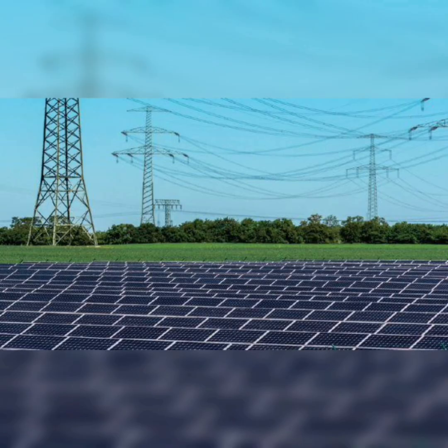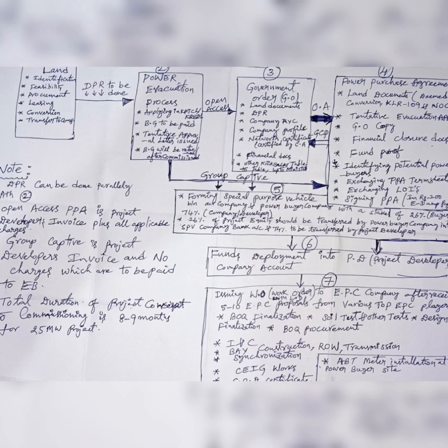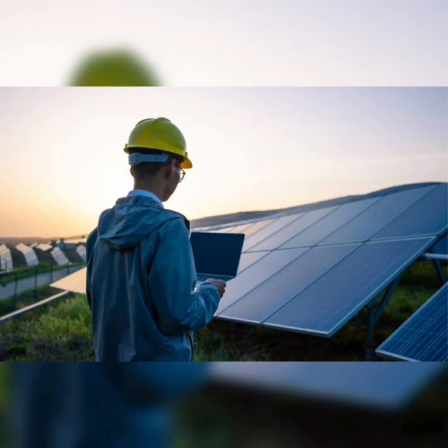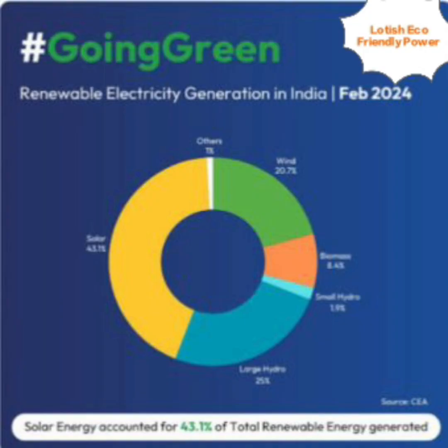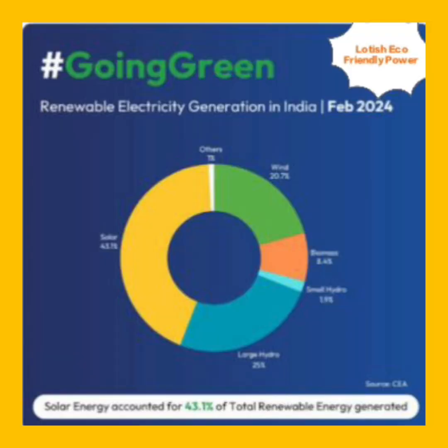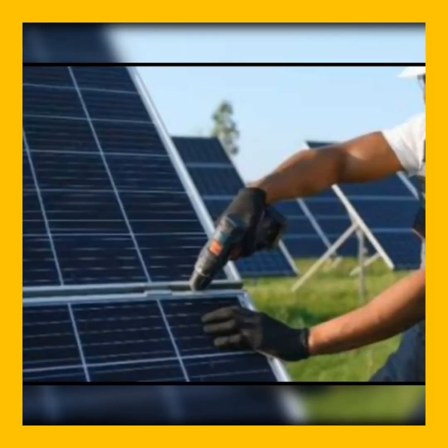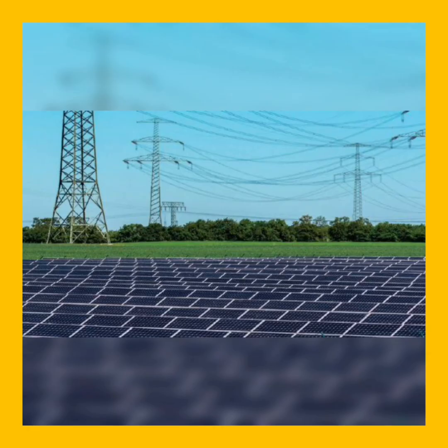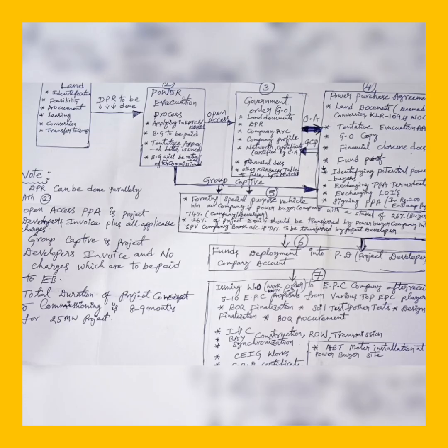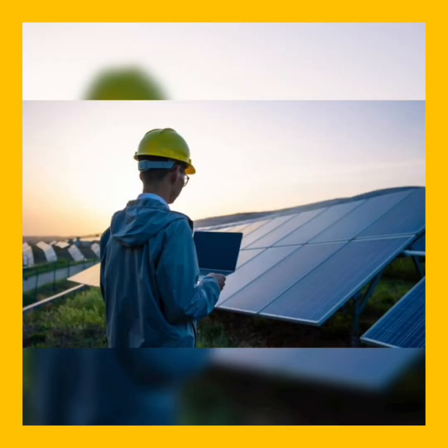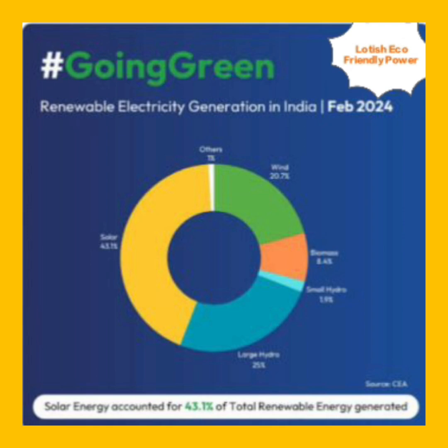In the SPV, equity can be transferred by both the power consumer and the power generator, as shown in the flowchart. After that comes funds deployment — funds procurement and financial closure. Phase 7 is the work order to the EPC company, that is the Engineering, Procurement, and Commissioning company.